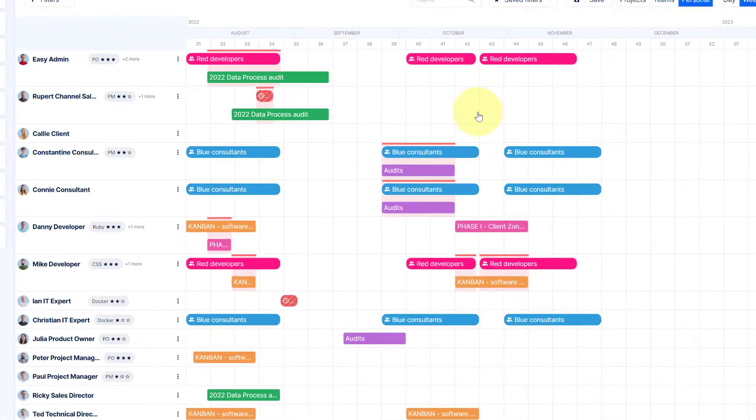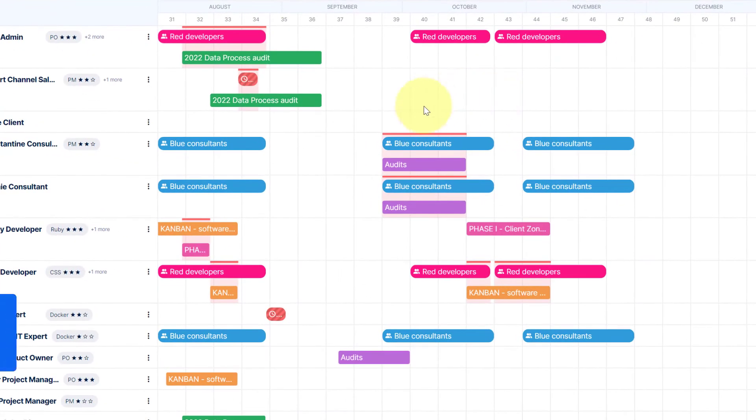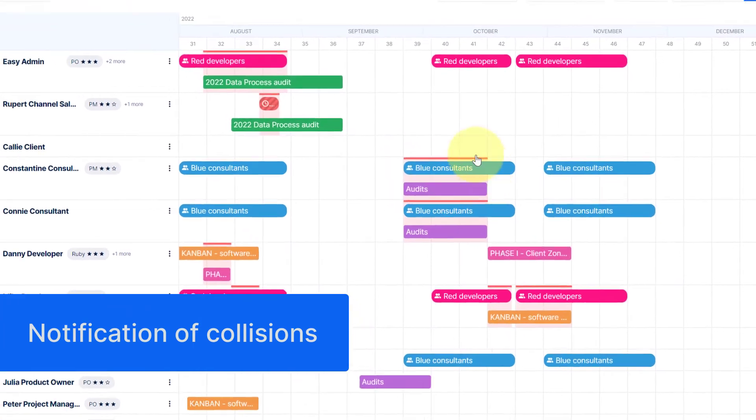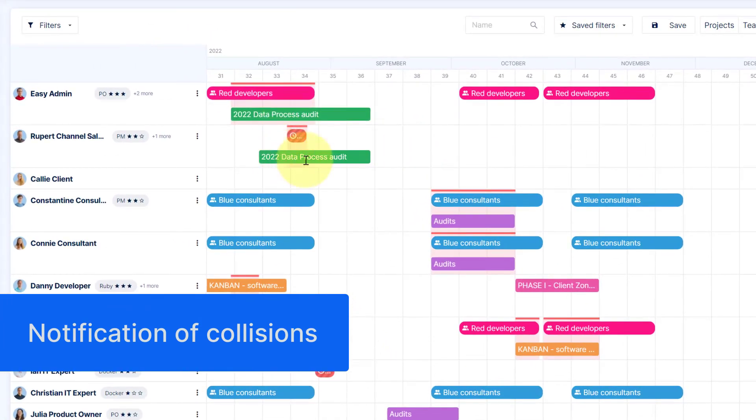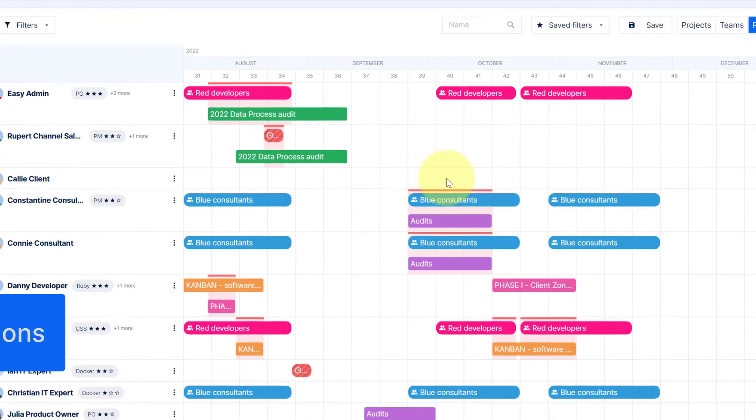Vacation and parallel allocation are automatically shown on the timeline when workers are simultaneously working on multiple projects.